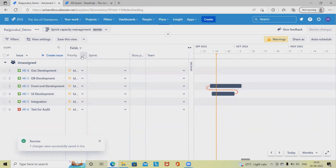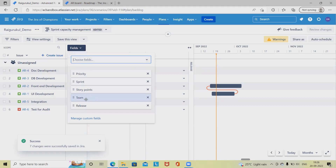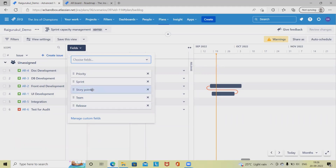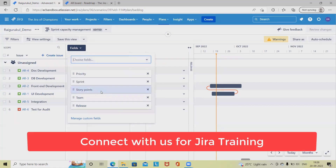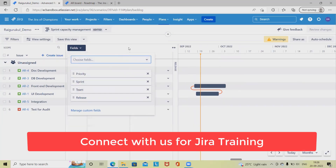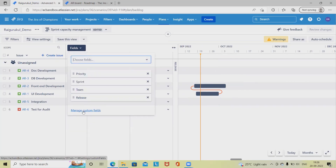If we want to enable the team sections, we simply select that option and the teams options will be available. If you want to enable sprint and story points, that is also possible to add from here. We have story points available, and if we want to remove them, we can remove them from here.